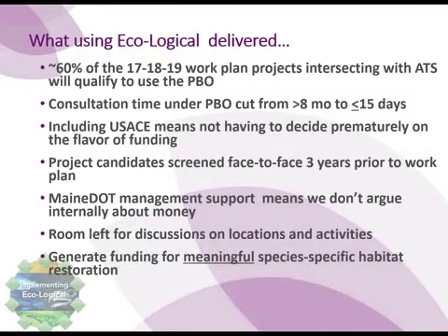Our consultation time under this will be cut from 8 months or more, usually up to 2 years, to 15 days. This also, we included Army Corps so that if, in fact, Federal Highway is not involved, we can still use the programmatic biological opinion.